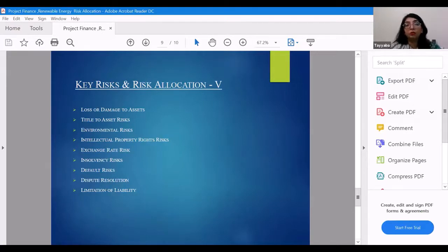So it's not a huge chunk, but if you mean managing risk, I think that would translate to somewhere between 5 to 10%, because everybody's charging a premium for that extra risk they're assuming. So your costs go up by between 5 to 10% if you want people to turn the project around for you completely, assume financial responsibility, and pay you damages if there are delays.